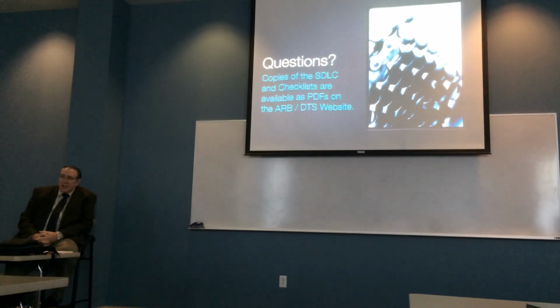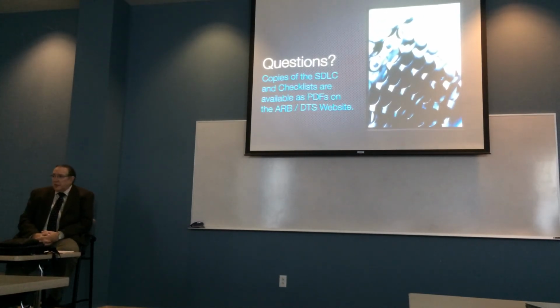Use common sense. For little iterative releases, no, I wouldn't go through this whole cycle, but I would certainly document the release and what you were trying to accomplish with it. I think you could use the iterative process within this SDLC. You go along and you're going to roll out a new feature. There's no reason why you can't hit the security piece and the integration and testing, and then jump back to your next iteration. You don't have to implement all of this in that iterative process, only pieces. And if it's already within your budget, there's no reason to go through stage one again. You've already been there and done that.